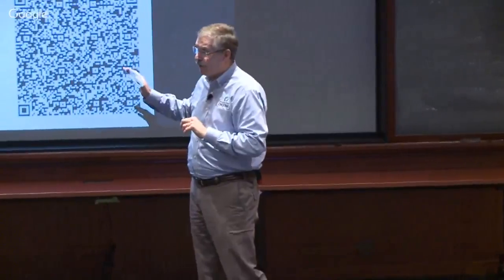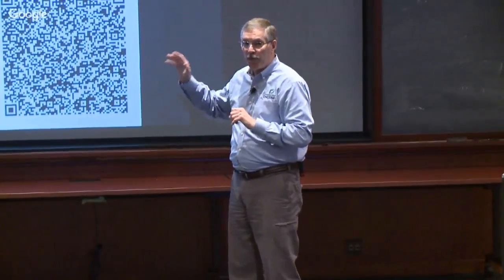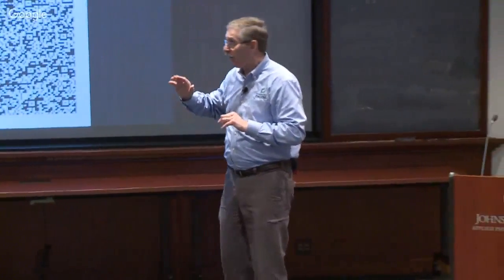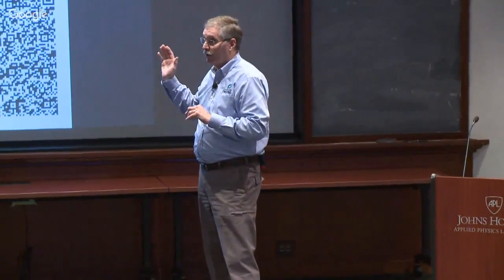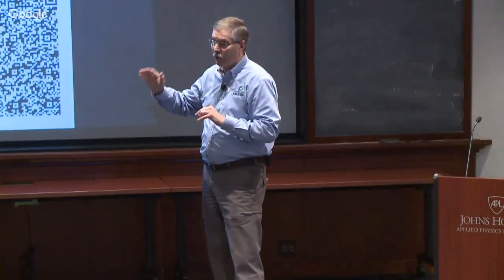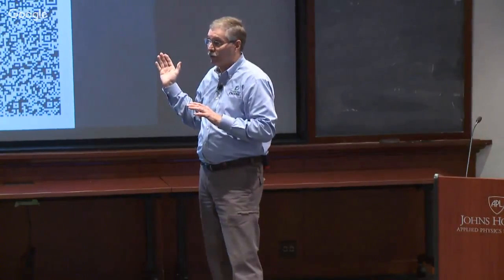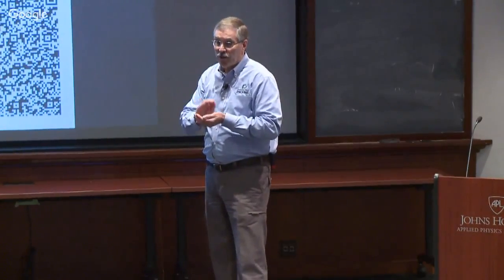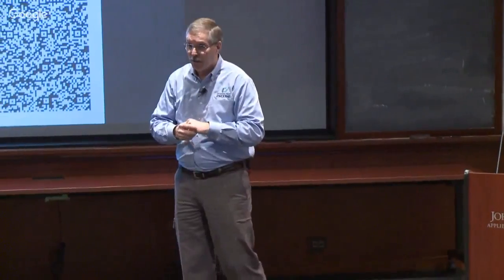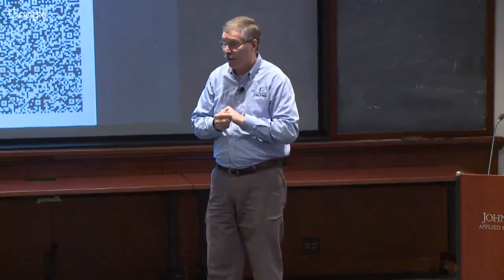In some places that's a challenge, but it's best for the initial project planning team to bring their perspectives, and then if they're very good SMEs or project managers or other kinds of decision makers, they can actually create all of this stuff that we saw here. We had a very small set of people that were real subject matter experts and could talk for that organization, and they were able to list all the other stakeholders and come up with all the other artifacts. So you need to get decision makers, and you need to use as little of their time as possible, because their time is hard to get. So you need to have it scripted and have the process down to where you can march them through and facilitate them fairly easily.